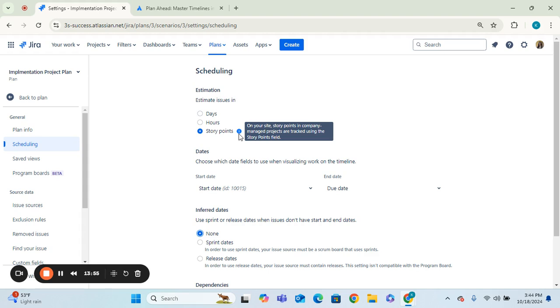In my opinion, this is an absolutely crucial feature that should never be grayed out or not given an option. So when your project is created, you are prompted to choose a Scrum project or a Kanban project. I recommend you always choose Scrum. And that's because even if your team works off of a Kanban board, if you create a Scrum project, you can then go and create a Kanban board to meet your team's needs and use quick filters to meet your team's needs as well.